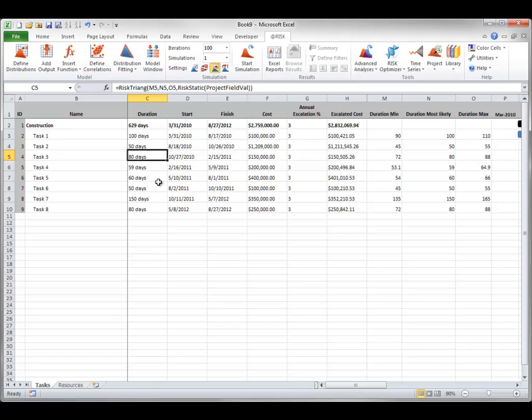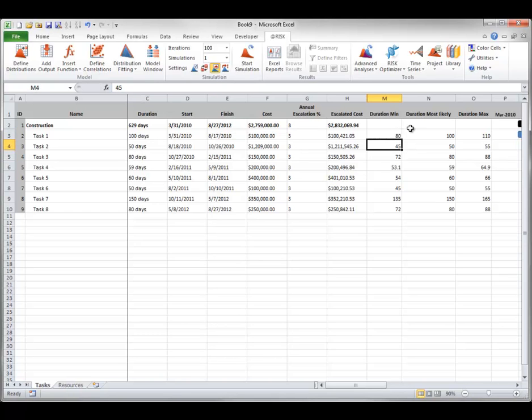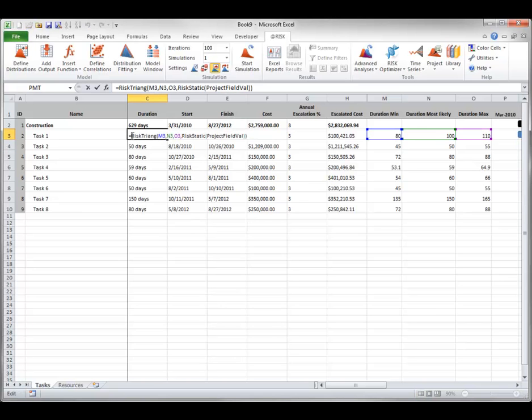At this point, you can change the values in the parameter entry table as you like. Because they are arguments to the risk triangular functions, the distributions will change automatically. Now I will add an At-Risk output and run the simulation in the usual way.